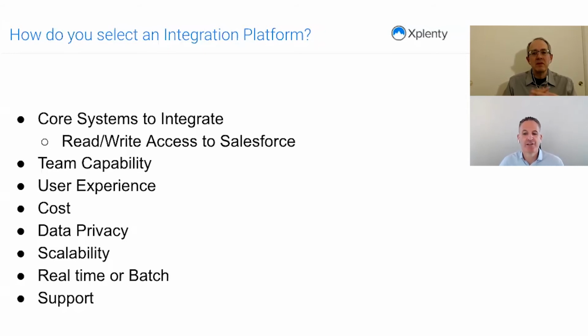The other recommendation I have is to create a matrix of your requirements before you actually talk to vendors. It's very easy to talk to vendors and get swayed on what's important because that's what the vendor has in their product set. I think it's much better to independently go through what you need from an integration platform, or whatever technology you're picking. Create a spreadsheet, with columns for the different features you think are important and why they're important. Get buy-in from your team that this is actually true and that it's really what you all want. And then when you go to market, you can talk to the vendors and actually see how they rate.